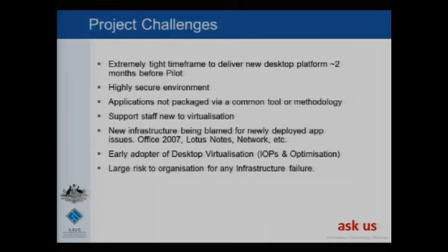So I'm not saying don't do virtual desktops, but just be aware that when you really load this thing up, you want to make sure that you've tested it more than what you think it's going to run at. I'm quite conservative in this project because we have peaks that occur. I wanted to be able to allow the peaks to go. If you're starting at 100% of the capabilities of your infrastructure, this thing is going to get popular once people start to consume it. So you want to make sure that you can grow with it. So definitely do a lot of testing if you can.